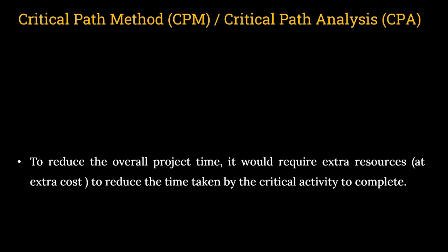What are the resources? It can be extra cost because of the material and machine. You have to employ more manpower. You employ some machine you require. You employ some more resources, materials. Then only it is possible to reduce it by 1 day. And if you reduce it by 1 day, then your project duration will also be reduced by 1 day. So instead of 14 days, it will become 13 days. Okay.